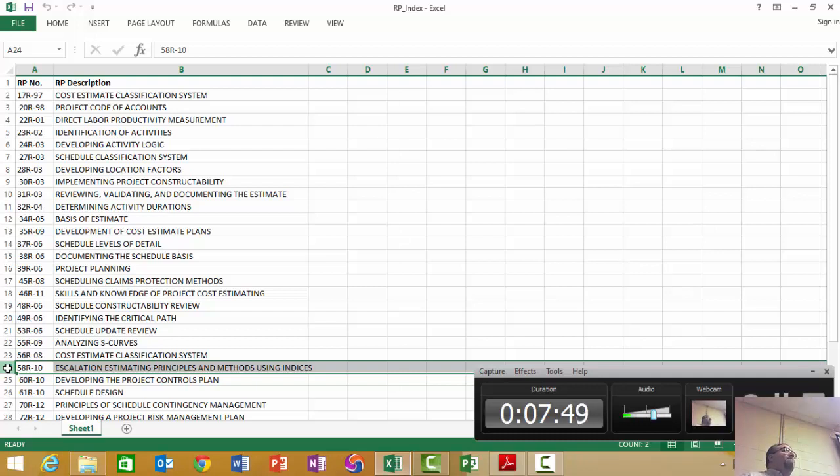Well, I don't recall the duration of both of these projects. I think they're both over a year. And I don't know if the calendars are working days or calendar days. That's something that you're going to need to know for your schedule as well. Is the contract time on calendar days or work days?